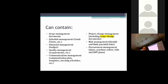Define scope, and where your project plan comes in. You've laid out the scope, the boundaries around your project. Say, you know what, that's not really something that is planned for this phase. Maybe we can look online, you can find scope change documents where the person making the request has to figure out how much time it will take, how much money it will take, and get a stakeholder response time before the project manager considers it. So scope management is a huge document.